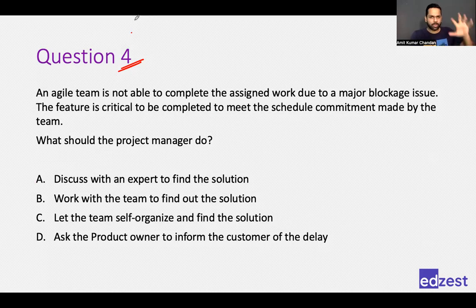So what you do is you have a product backlog, a list of all the items. When the product owner prioritizes it, they prioritize it in terms of value. The team will say, based on our understanding of how much effort is required to complete these user stories, we can do the top 3 or 4 items. Whatever 3 or 4 items they pick becomes your iteration backlog. For example, the team will pick from the top, understanding the story points and complexities, and say, in the 2 weeks of our iteration, these are the 4 items that we can do. They'll move them to the iteration backlog. That's what we do in terms of iteration scope.